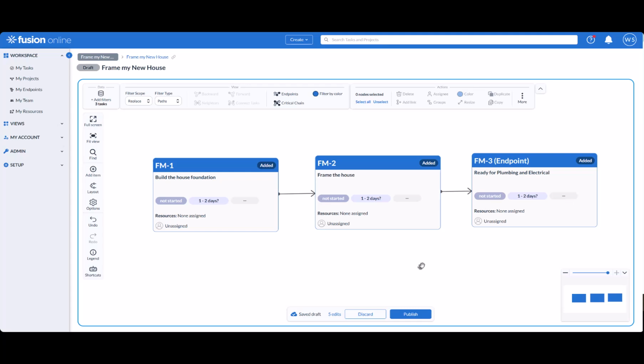A quick test is to read the link backwards. We can't do this task until right after that task is done. Unless that's true, don't add the link.